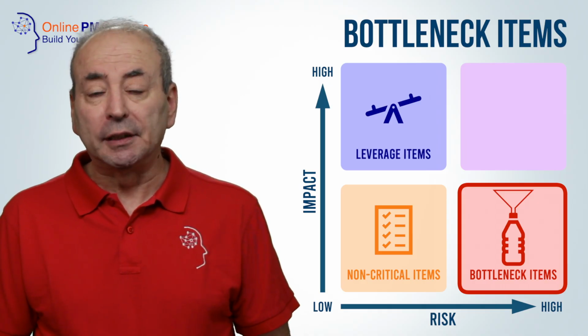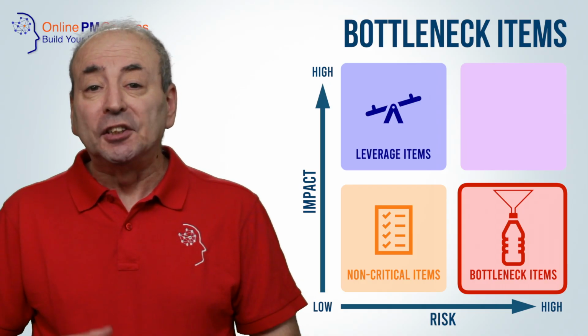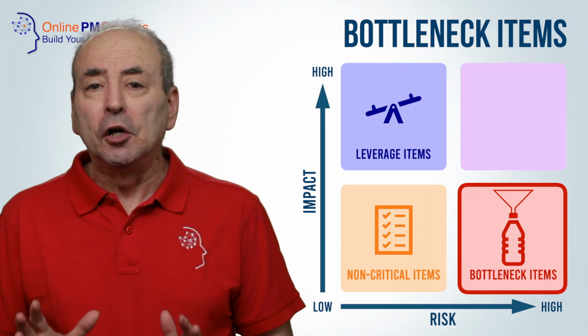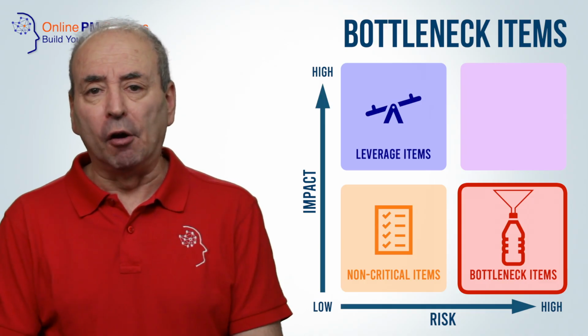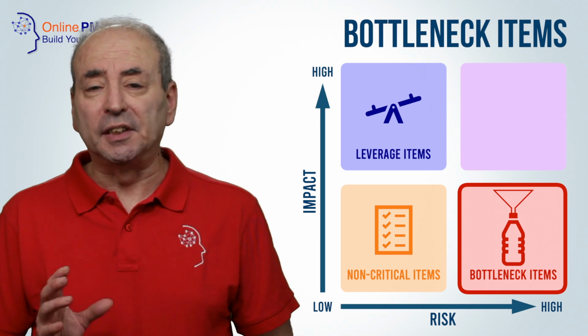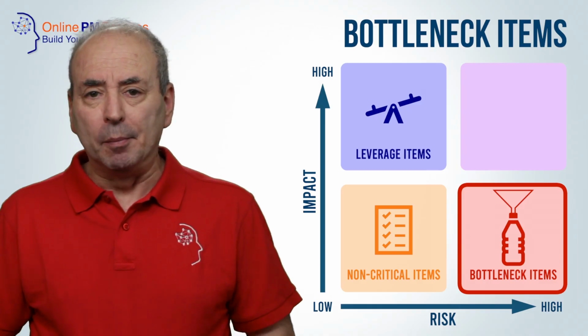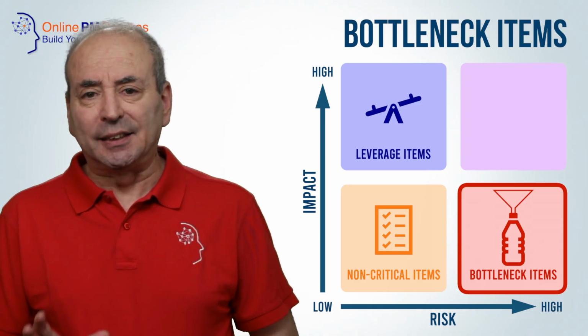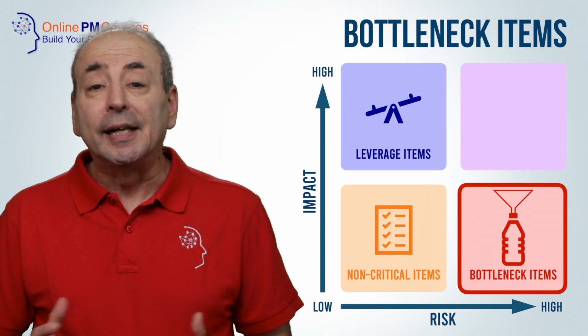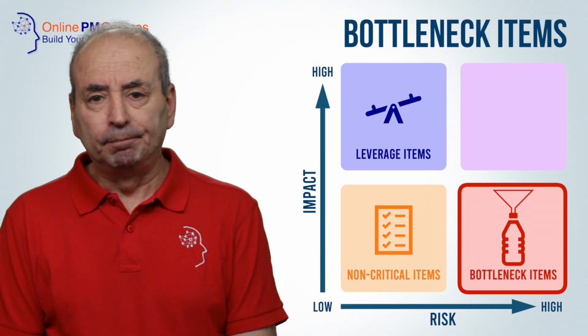Another way to reduce risk, which does have a cost, is to create a buffer with securing stock and holding it yourself. In terms of services, this might mean a call-down contract with a pre-commitment that guarantees access to the services you need, which again will come with a cost premium.